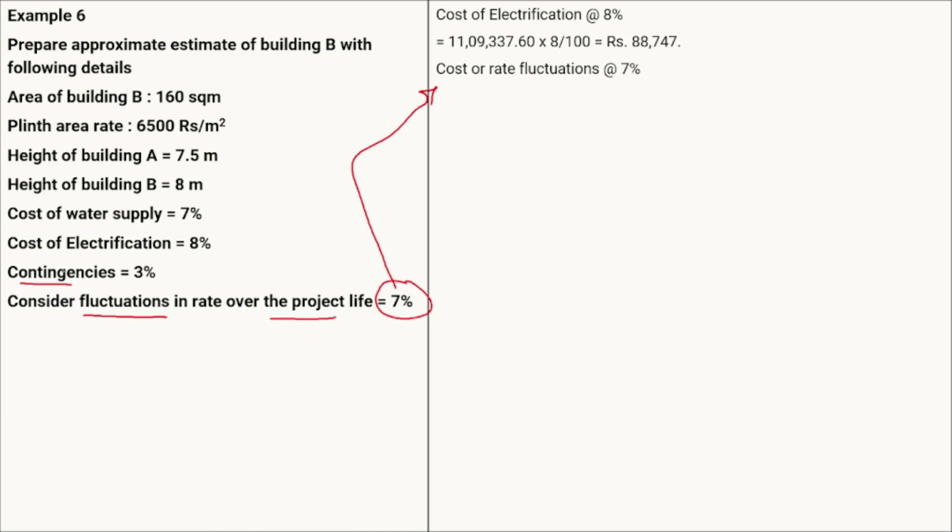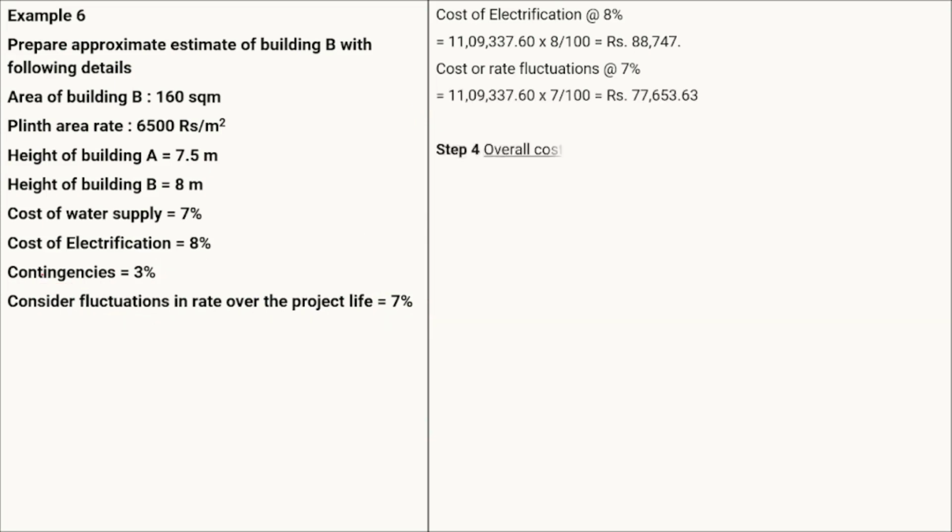As I said, other than the contingencies and the supervision, whatever else is given should be taken as services. It can be referred to in many other wordings, but remember that other than the contingencies and the supervision, all should be taken as services. Okay, so next, contingencies.